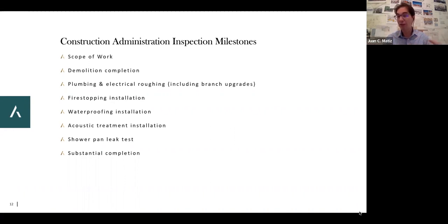Those are the city inspectors, but the architects and engineers who file the drawings usually are also responsible for signing off the job. And so we as professionals usually come at the end of the job to make sure everything matches the drawings and that everything's been built accordingly. All of those checks and balances usually keep everything fairly straightforward, and there's enough checks and balances by either the professionals from the license or the plumbing or the architects and engineers that at the end, most clients should end up with a properly reviewed and a properly inspected project. They shouldn't be doing that themselves, to be honest with you.